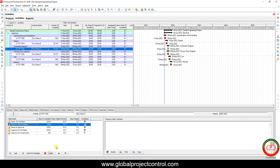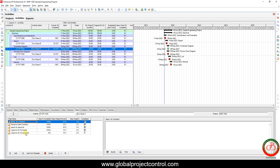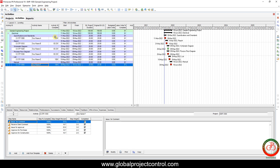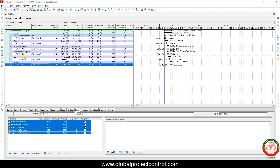Let me remove these two steps and come back to the current situation for this project. Here we have the steps for the project, but as you can see, each document has a different progress. The question is: what is each step's progress in the overall project? How many documents are issued for comment, how many have received client comments, how many are issued for approval — it is very important to monitor this data.